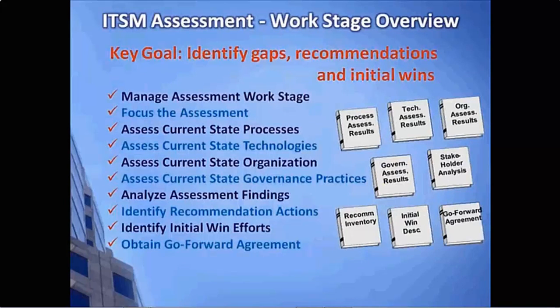In the assessment stage, we look at current state, identify gaps, remedial actions to close them, and obtain agreement to move forward on those actions. Note that your assessments can yield lots of actions. By having our vision first, we now have the capability to hone in on those actions that best address the vision and the goals we want to achieve.